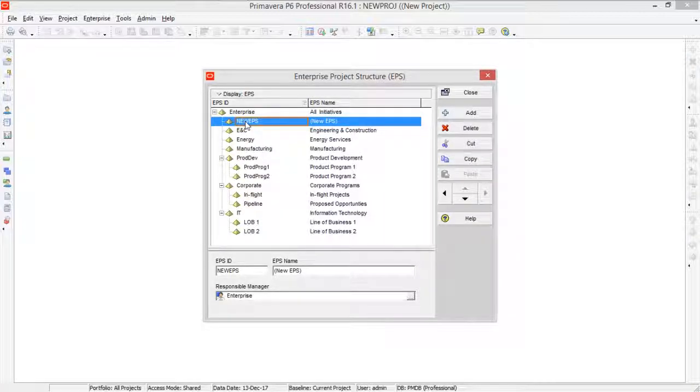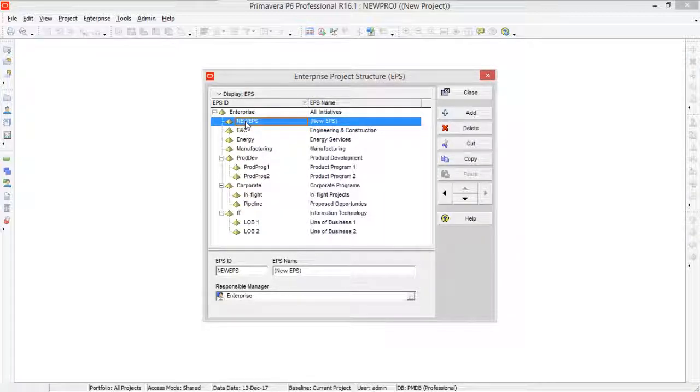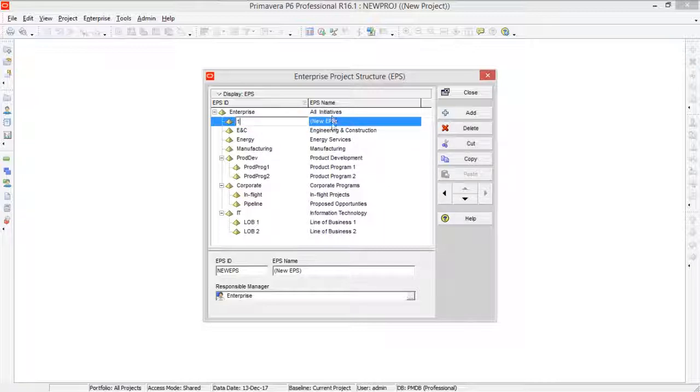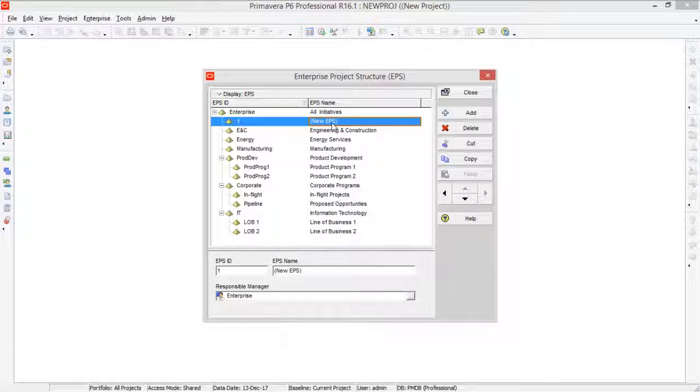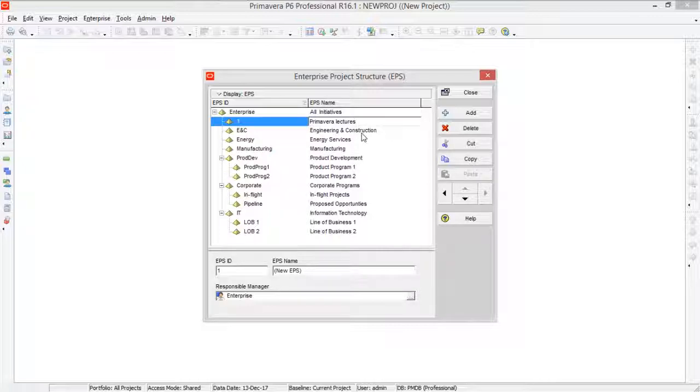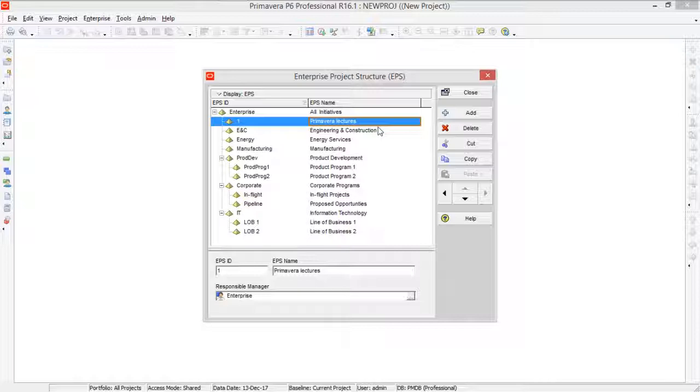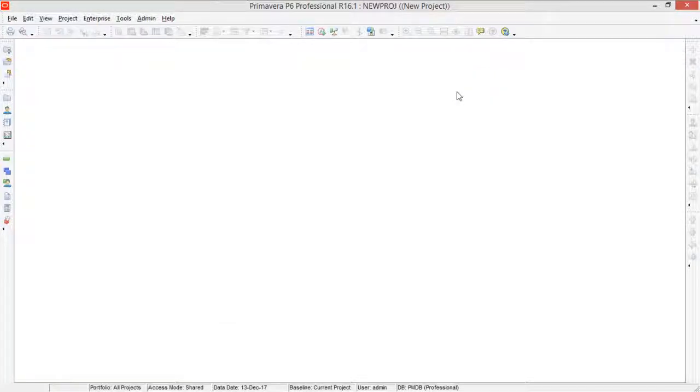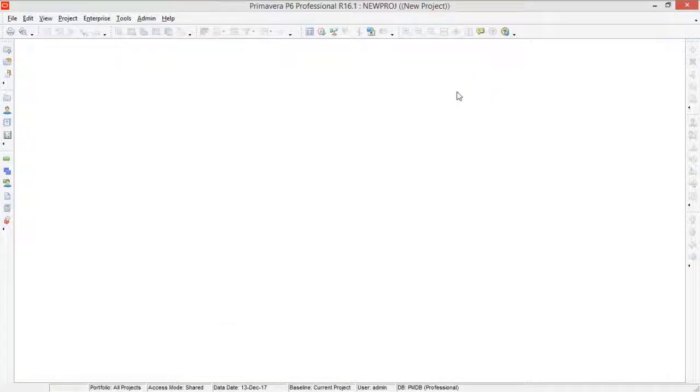So first give ID to your EPS. Let me give this as one and the name of your EPS is Primavera Lectures. So click anywhere outside or press enter and then press close.